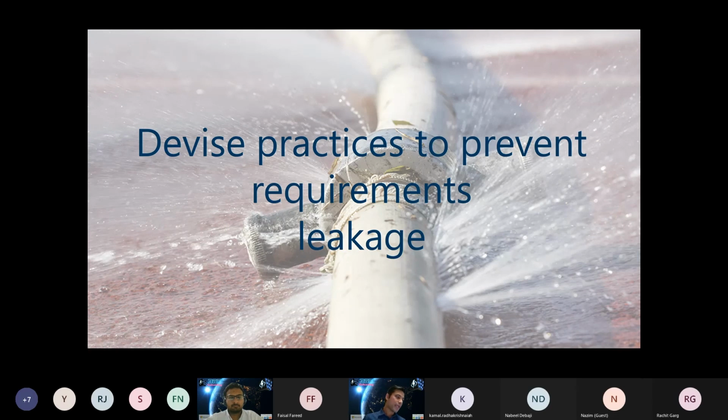So the solution here is that when a leakage problem arises, prompt actions must be taken. Project owners must be informed. A reliable and cost-effective way to confront leakages is to use process mapping artifacts and standards. You should have every requirement mapped to a process. If it's not mapping to a process, it may not be a requirement, really.